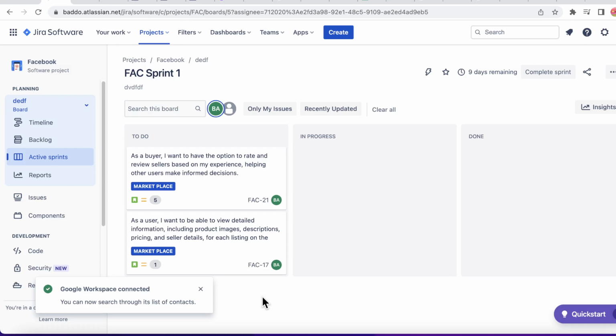But this user story you are going to add to the work, you are going to make sure it goes through all the process of refinement. You add the description, you add the acceptance criteria, you add the version, you add every other thing that makes it whole. Any attachment that needs to be attached, mockups, wireframes, anything that has to be. And then you estimate it. Then you can bring it to the sprint.